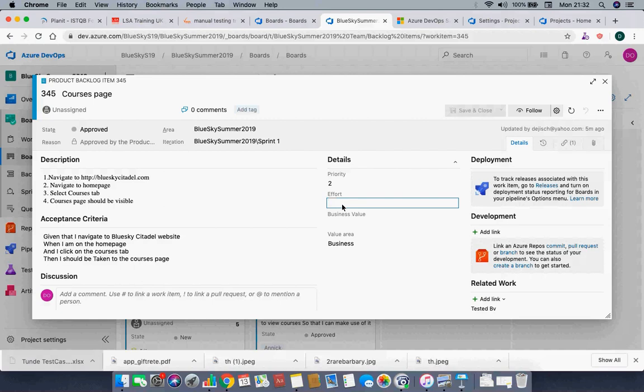I've also worked in organizations whereby they use different metrics to measure the complexity. Complexity is one of the metrics to measure the effort, and they also look into how repetitive it is. It's not complex, but there are lots of things that we have to repeat. Because we are repeating that, it also adds to the time, even though it's not that complex. That is one.